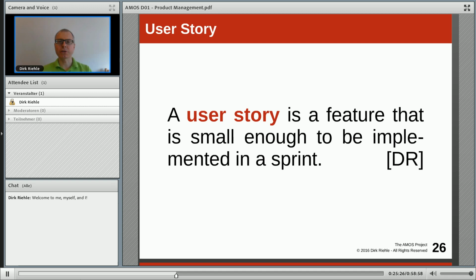We don't do that because we have technical product owners in the AMOS project, and we want the features to be so small that there effectively has already taken place a breakdown to such small pieces that any developer can pick up any of these features and implement them within the upcoming sprint. So there is a mixture here: a feature sometimes has the pure business value focused qualities, but sometimes also has a task breakdown quality to it.